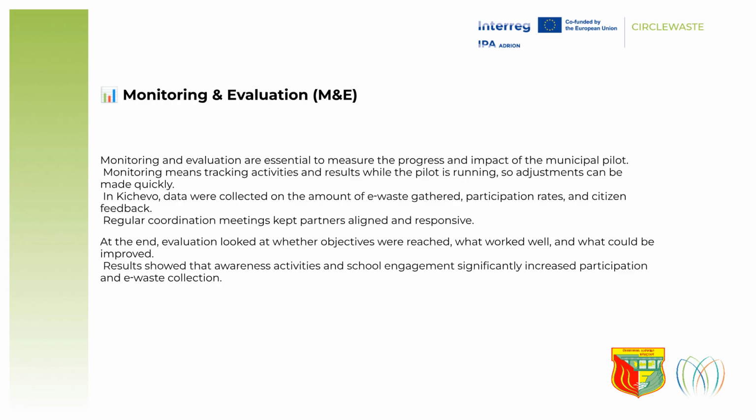Step 7, closeout and evaluation, involves concluding the pilot with a stakeholder review meeting, summarizing achievements and opportunities for scaling up. Prepare a report with data and lessons learned. Communication must be continuous and two-way, keeping citizens informed about progress and thanking participants.